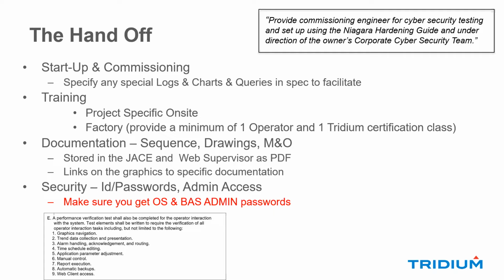But I personally feel that a lot of these logs for commissioning can be set up and specified ahead of time. A lot of these commissioning agents really rely on good, rock-solid trending data. They rely on charts because those queries and charts can help show how well the building's operated while they're doing the commissioning. So we need to be thinking about that, and any feedback from commissioning engineers out there that we should add to our standard guide specs, we would be open to that.